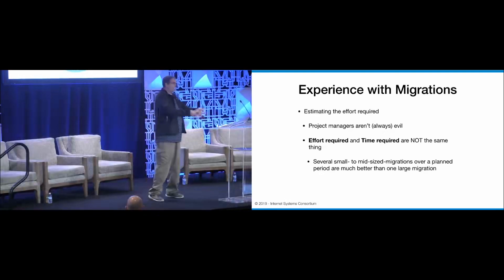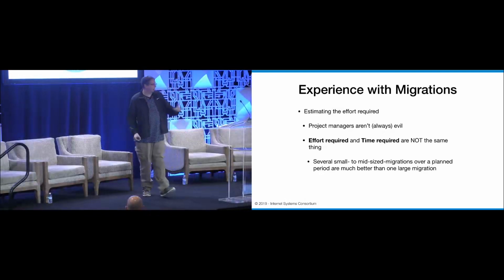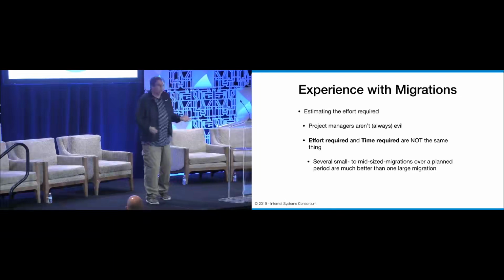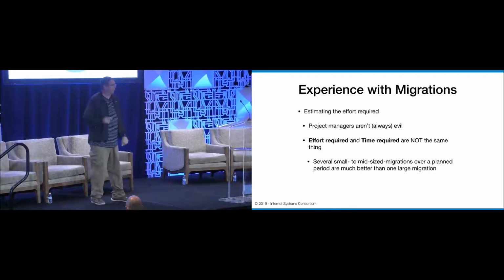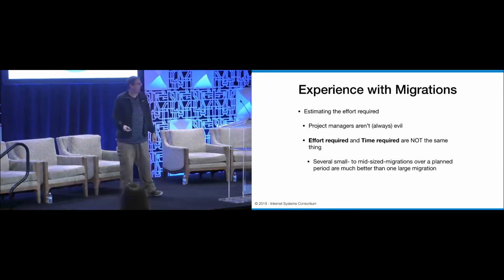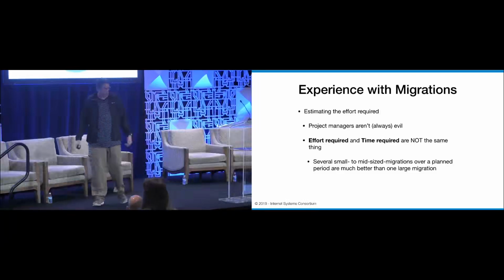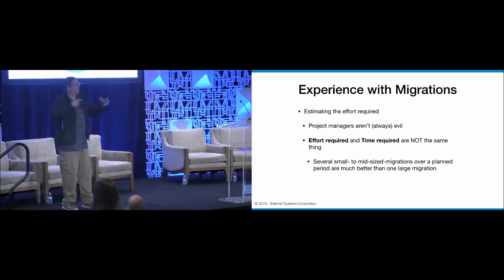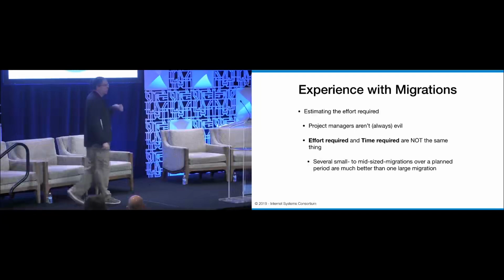You're going to need to modify your lab network to start using the new software. Look at regional offices. Well, if it's out there at the end of the network wire and it takes us 3 hours to drive out to that facility, is that one of the best places to start a migration? Probably not. You need to consider all the mechanisms that you're going to have to deal with: network, physical access, and everything else.